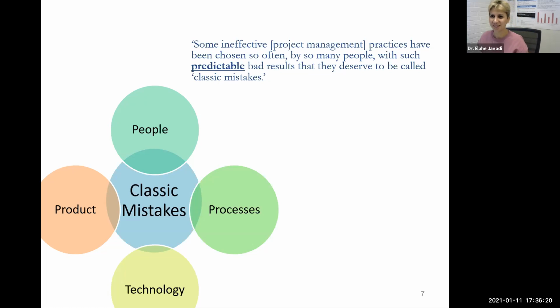I think the 4 are totally dependent, and all of them are interconnected, so they came up with these mistakes that were happening again and again. Okay, yeah. They came up with a list. I want you to guess. Do you think those mistakes were mostly related to people, processes, product, or technology? I think it might be people. Exactly. Good guess. People and processes were top, more than 40% each of them. And I think it's about a single digit percentage for technology and products.